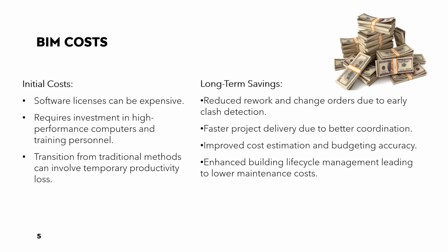So the costs can be various, but they can be initial and long term. As for initial, the software licenses can be expensive. They do require investments in high performance computers and training personnel, which is highly important to be able to manage this, as well as transitions from traditional methods that can involve temporary productivity loss. As for long term savings, it reduces rework and change orders due to early clash detection.